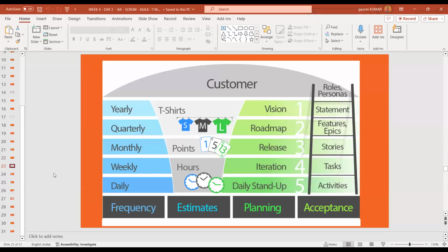So what you see here. Generally, a project is coming in, and you are given a big vision of why you need to do it. Based on such vision, you will receive some document from the customer, like a statement of work. Based on that, you develop the release plan, where the roadmap is decided and the release milestones are very clear.